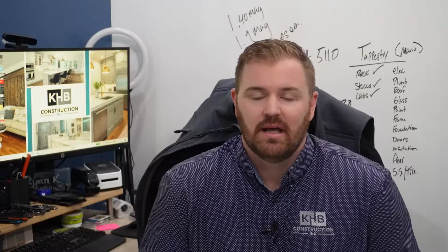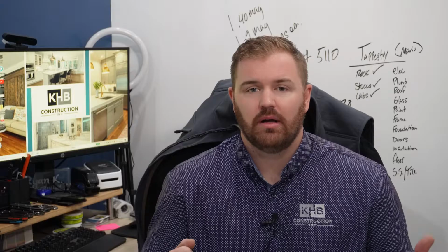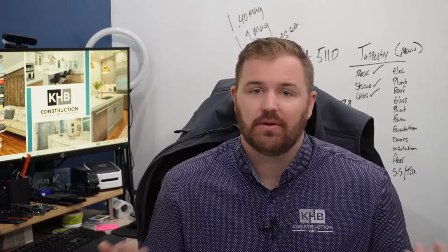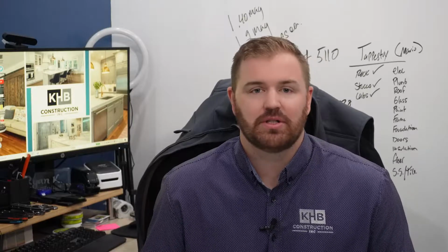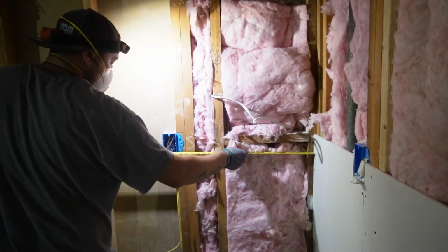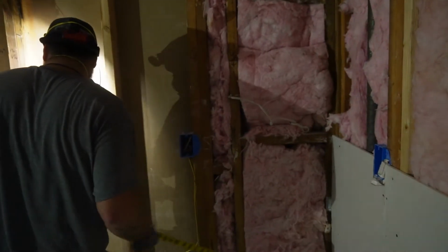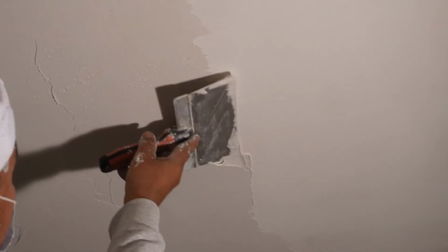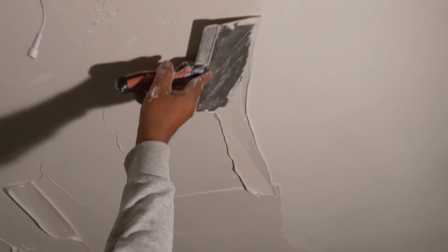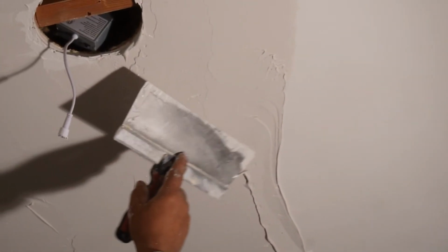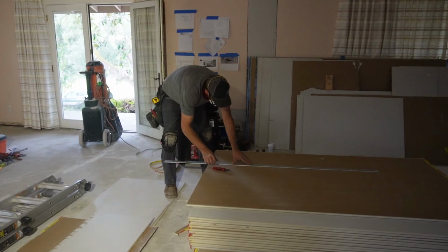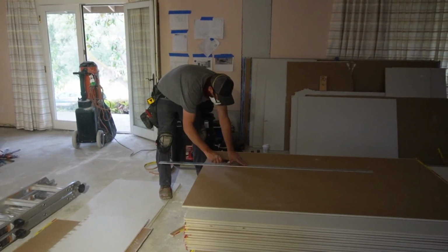The fifth reason your change order costs the way it does, and this is a contingency one, is if we have to go back and touch something we already did. So let's say you want to run low voltage throughout the whole house. You want to do a surround sound system on smart switches or something crazy. That might require taking down drywall if it's a 2-story home and you want to do it on the 1st story. And let's say the drywall is taped and textured already. That is going to be a major expense. That is going to cost a lot more money than doing it before drywall went in.